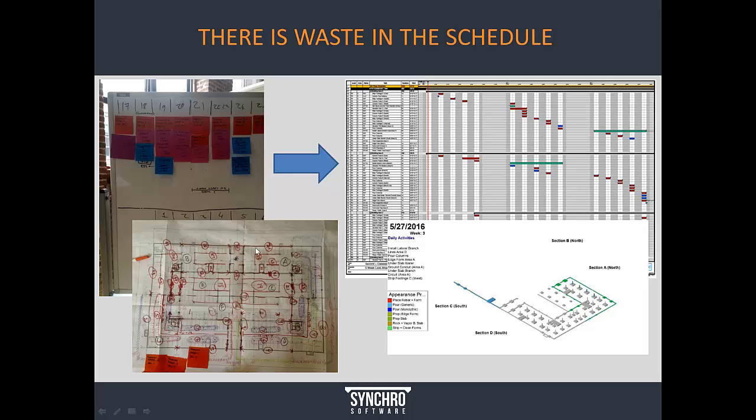Current methods include pull planning and so forth that are done using tool sets that are collaborative by pulling subcontractors together as a means to focus on a milestone, look backward from that milestone, and be able to sequence and collaborate on the planning of the activities in a coordinated manner leading to that milestone. And that's done typically using markups and sticky notes and so forth.